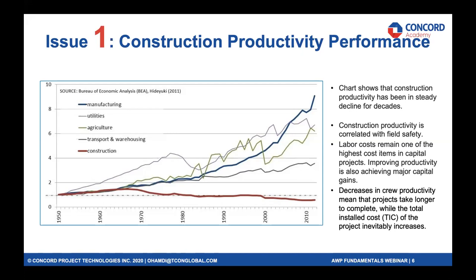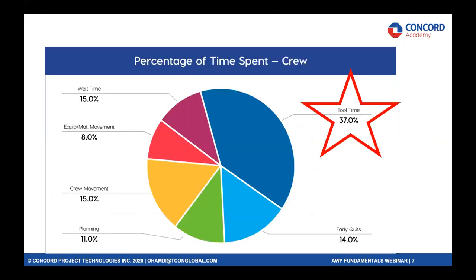Productivity is correlated with safety when it comes to labor, and labor productivity accounts for one of the major line items in construction budgets. An improvement in that will help us achieve more predictable and more productive projects. Within the advanced work packaging system, we look at labor productivity from the perspective of time spent on tools. Data from COAA and CII studies on labor productivity in the petrochemical industry shows that only 37% of the time by one worker is spent on tools.